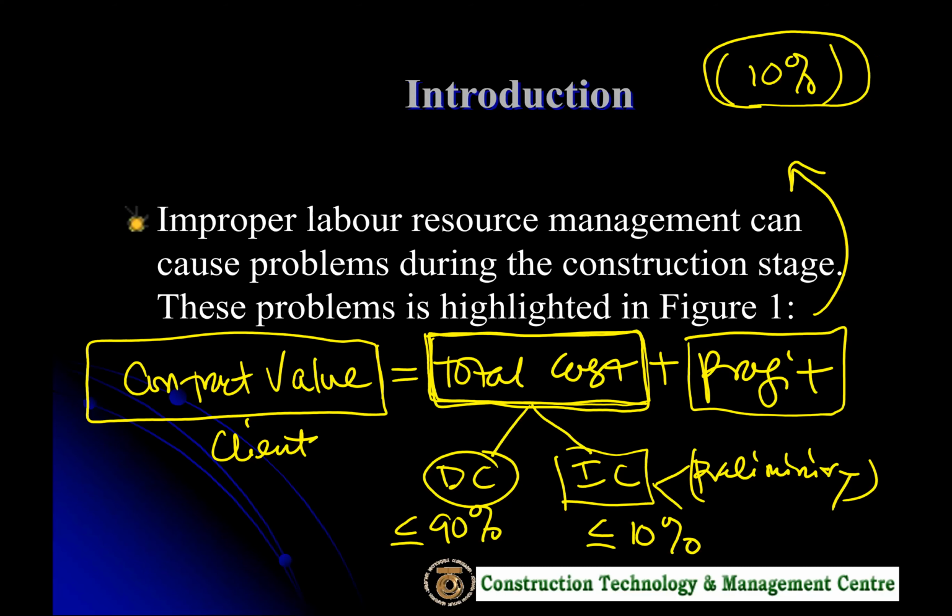We are not talking about gross profit. Gross profit would be more, but after deducting a few things, what remains is maybe around 10%. Initially, a contractor might put around 15% to 25% of the profit in the calculation. But at the end of the day, due to lack of control, the contractor might lose a lot, and end up with something like 10%.